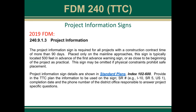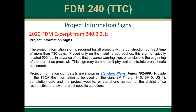Project information signs: the 2019 FDM had the old 90-day requirement. That is being updated to a much lengthier period. From the 2020 FDM excerpt from 240.2.2.2.1, the project information sign will now only be required for projects with a construction contract time of more than 730 days. This should eliminate the use of project information signs on a considerable number of projects. The other requirements are still the same at this time.